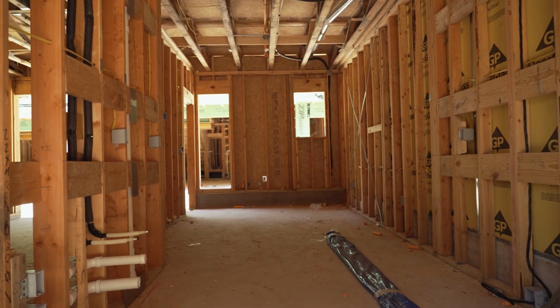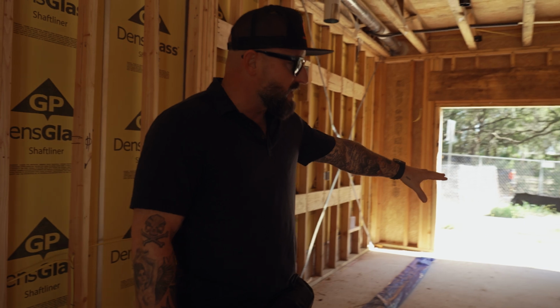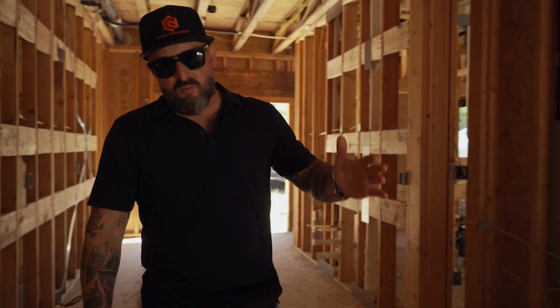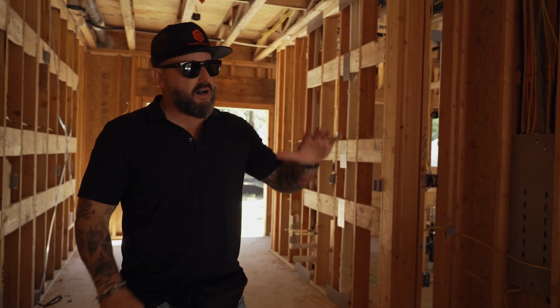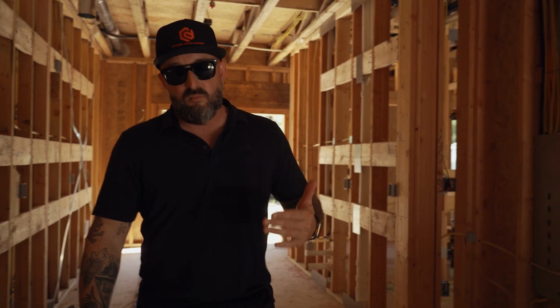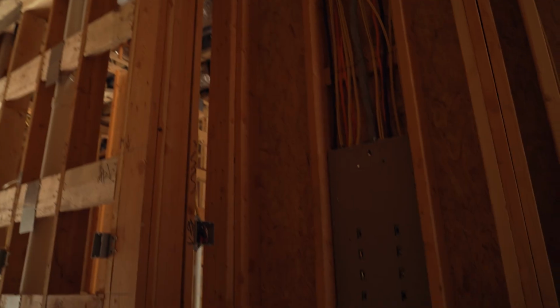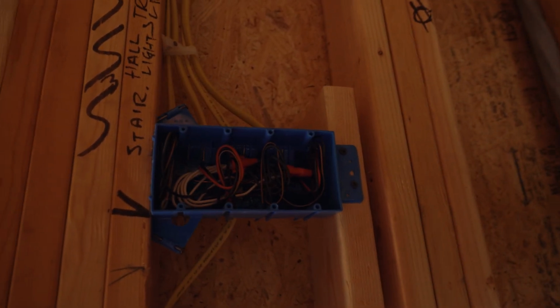So as we're finalizing all of our interior inspections, we'll be ready to come in, clean up, do a specific sealing process, and then we're gonna start spray foaming and installing bat insulation. So another thing that's really critical at this stage is that you double and triple check the rough-in locations of electrical, plumbing, basically all your devices, right? So since we've got plumbing roughed in, since we've got electrical roughed in, our superintendent and project manager have been really diligent about walking around, pulling a tape measure on stuff, right? Everything's detailed out on the plans, or at least we can scale pretty accurately on the plans. And we're simply going unit to unit to unit, pulling a tape measure, making sure that everything is in the exact location that it needs to be.